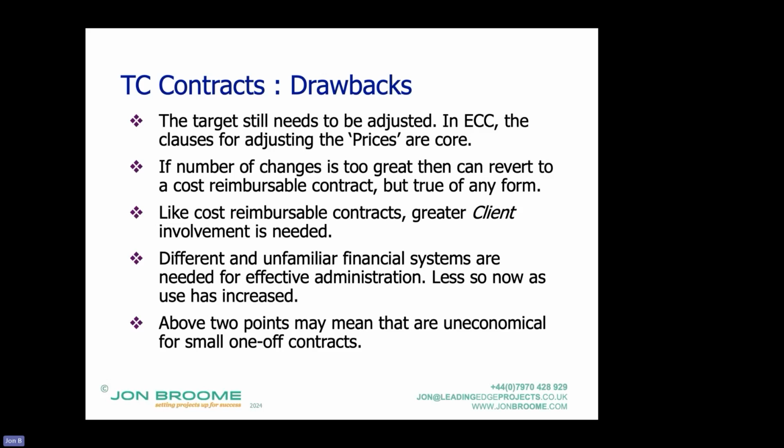The second line of defense, as he put it, is the QS side, the site establishment, the project team, if you like. They need to understand it, be on top of it, etc., but not ask for too much because it becomes big bureaucracy. And then the third line of defence is what the speaker was talking about mainly, which is the independent audit of it. So there is that extra cost in there.